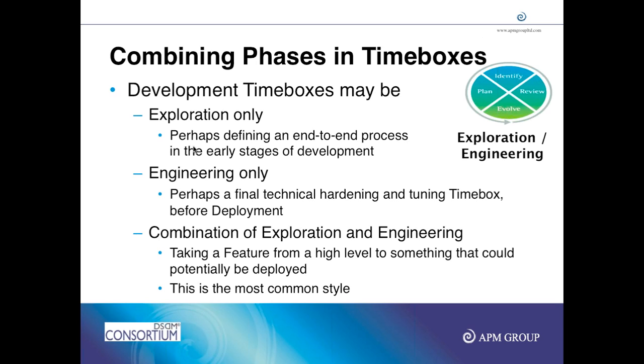You can combine the exploration and engineering phases, like you can have various ways of using exploration and engineering. For example, you can only do exploration time boxes, let's say on my project I have got 4 time boxes in release one. In the first time box I can just do exploration, and in the next time box again I do exploration. So I first take the requirements, make a prototype, again I refine the prototype, and then in the next 2 time boxes I do development and testing.